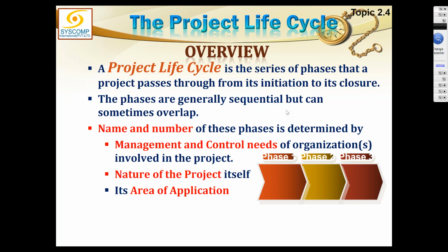Although I do agree that sometimes there could be some overlap, but please do not make it a habit. The overlap you create would result in fast tracking, and fast tracking is increasing the risk. If I have not completed phase 1 and I start doing phase 2, then the overlap period is a dangerous period. I am taking the risk. Although I will be able to perform earlier, and the project will be completed earlier, at the same time I am taking a risk.